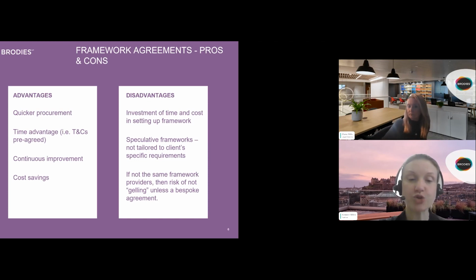If a party procures their own framework agreement, it may be you can include within that a parent company guarantee that covers all call-offs let under that framework agreement.